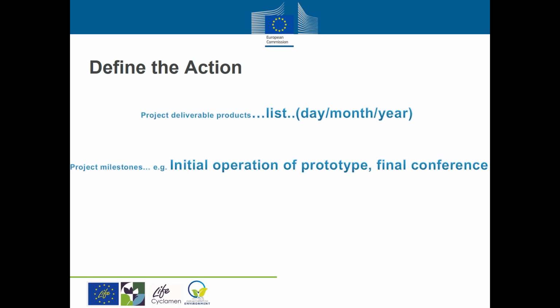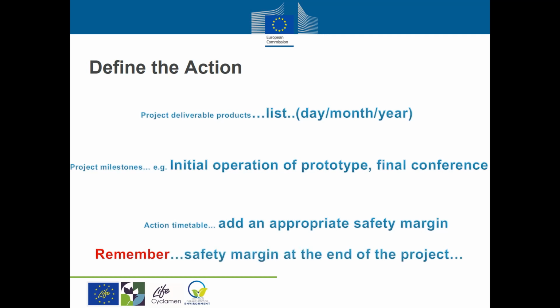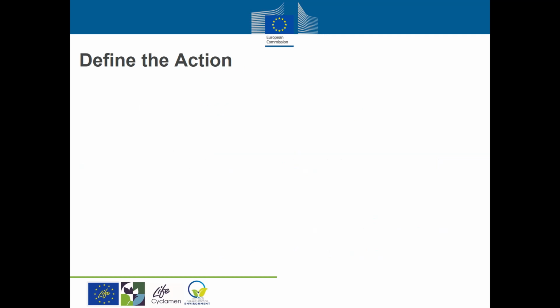Action timetable refers to the corresponding implementation period of an action. Remember to add an appropriate safety margin at the end of the project to allow for the inevitable unforeseen delays. Now let's see some important points.